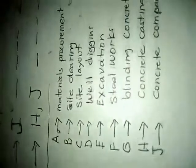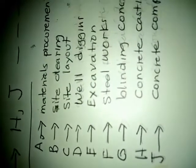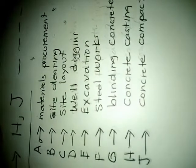The first activity is you procure the material. C is site layout. D you dig the well. E you excavate for the floor. F you do the steel work. G is the blinding concrete to level the ground. H you cast the concrete and I you compact the concrete.